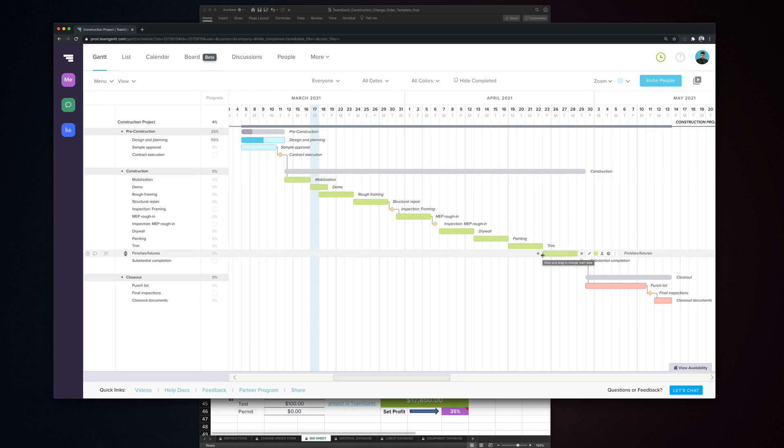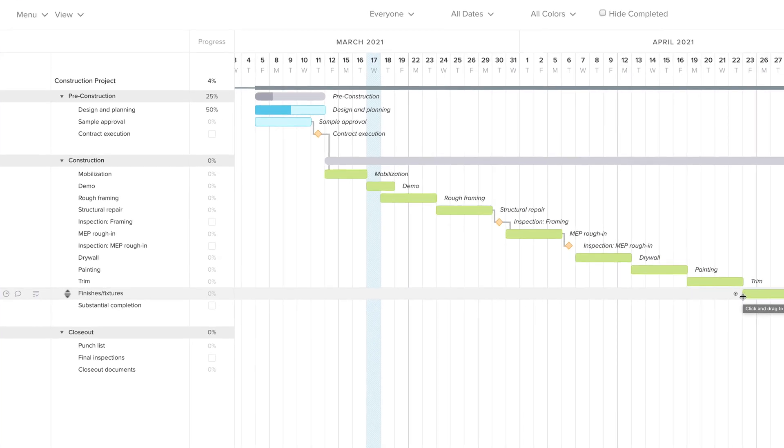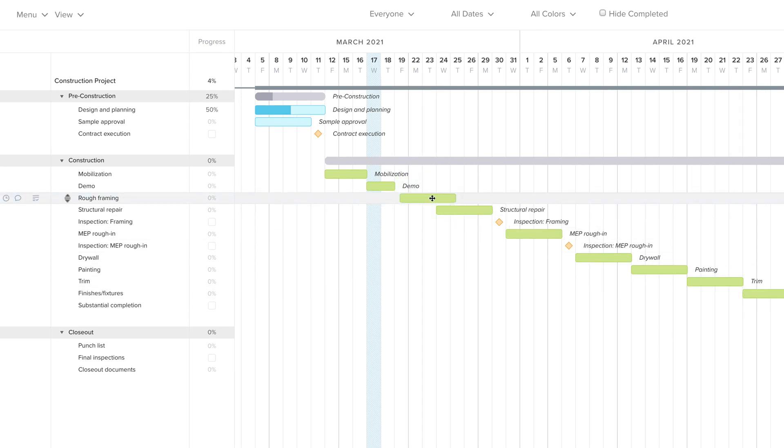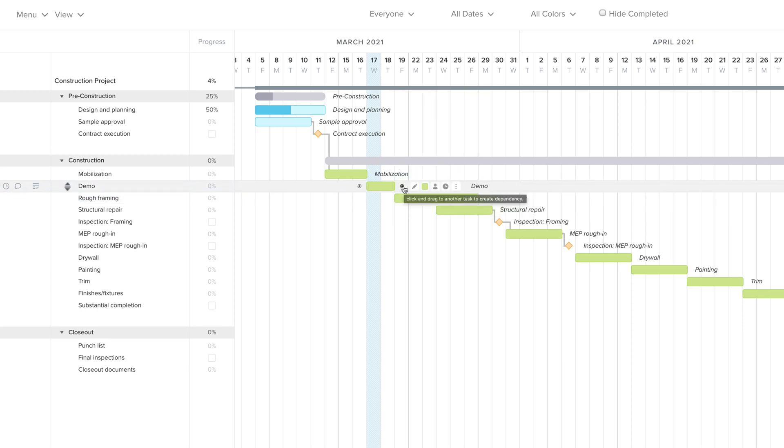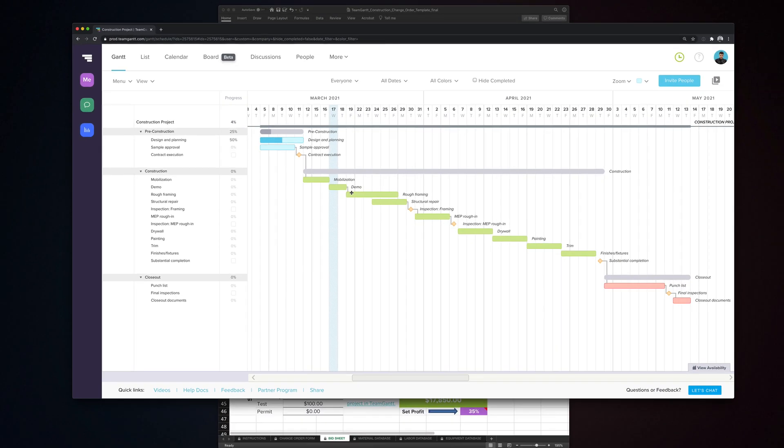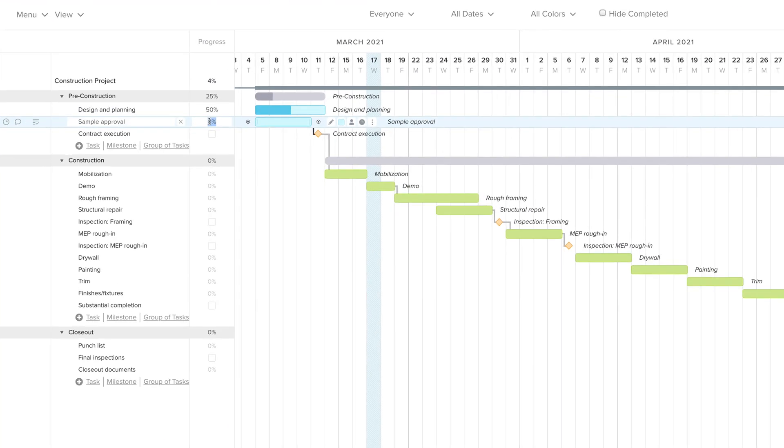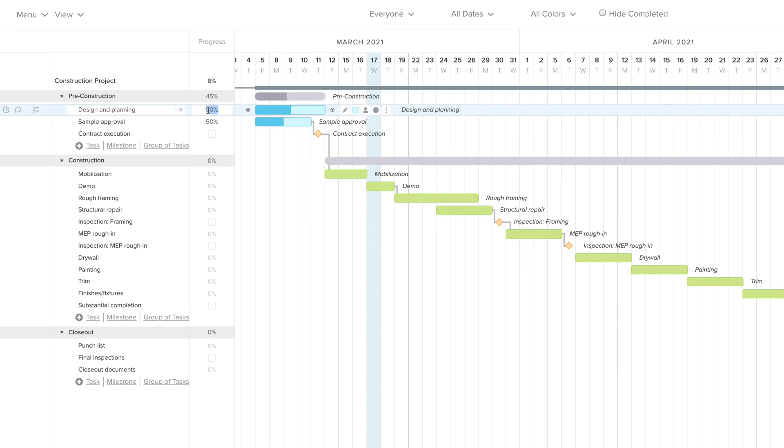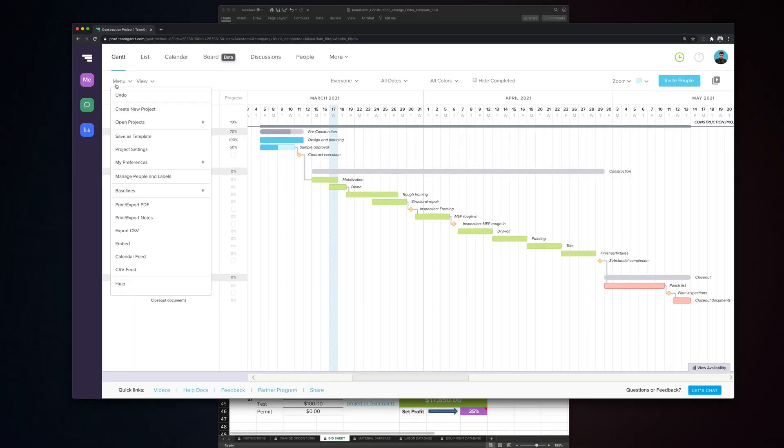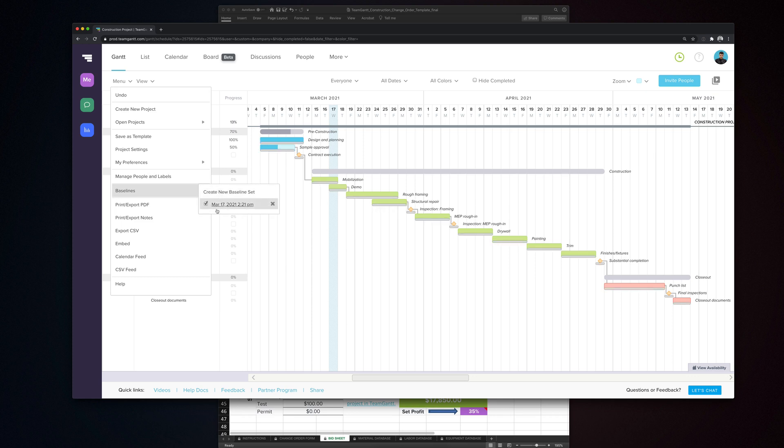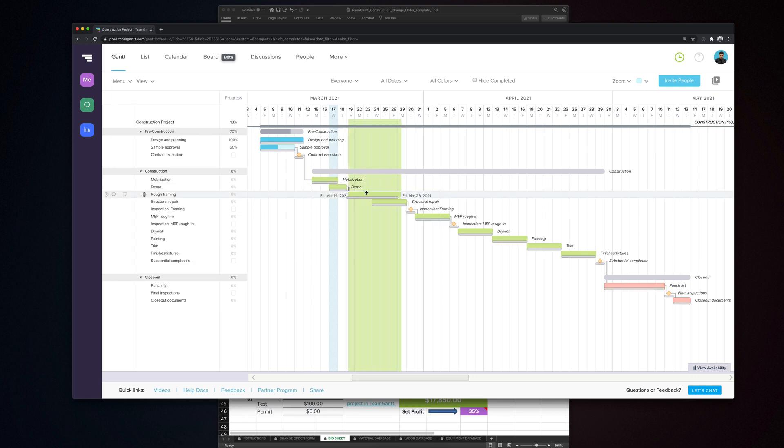First, it's super easy and intuitive. So if you want to move a task, you just move it. Drag and drop. It's that easy. You want to extend a task? Just click the end and drag. Add a dependency? Boom. You're done. It works exactly how you think it should. This makes building a powerful, clean, easy project plan super fast, and maintaining it's fast, too. When you need to update progress, just enter a percentage in the progress column, and it updates. You've already seen how easy it is to move tasks when they shift, but if you need to keep track of how the project changes over time, you can set a baseline. Then, when your project moves, you can always toggle it on to see how things shifted.